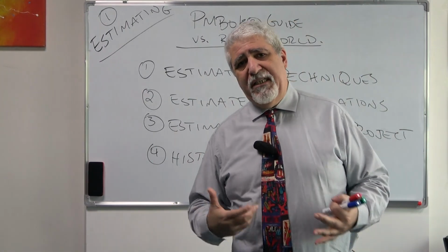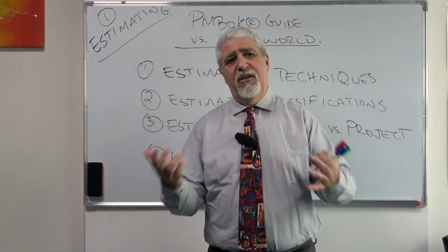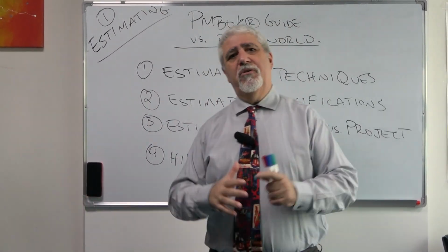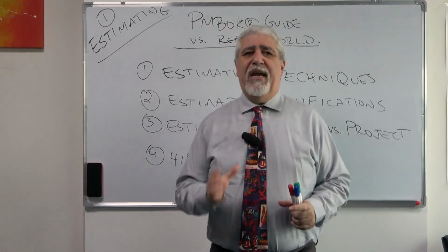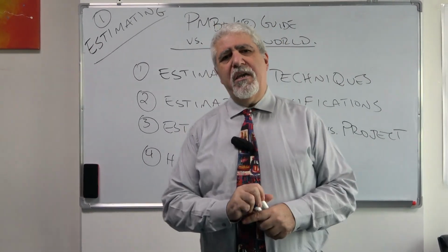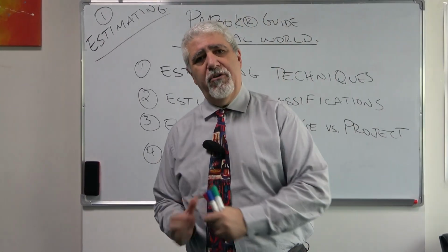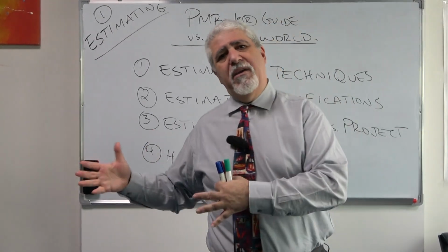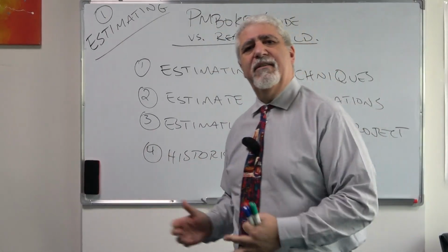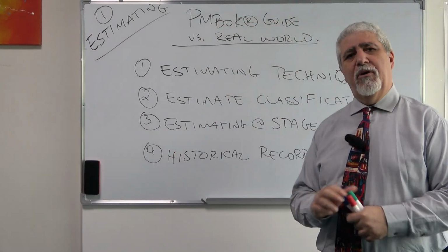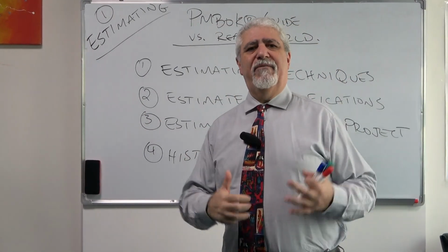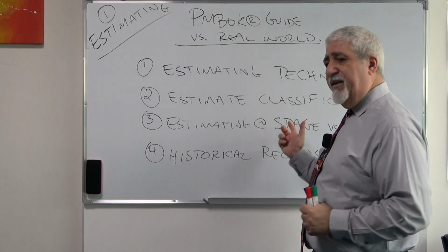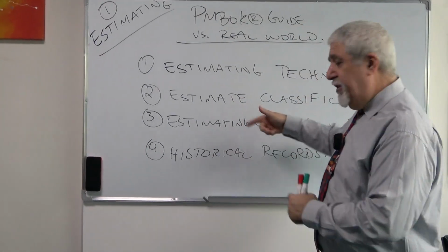So what organizations like AACE tell us, and other literature, is that they come up with about 5 different estimate classifications to use on a project life cycle. Now, does it mean we have to use all 5 on every project? No. Usually, on most capital projects, if you are a project owner organization, you use 3 of the 5. And maybe your service provider, your contractor, your engineering consultant, your construction companies will do more estimating. But from a project owner perspective, maybe we use 3 estimates. I will show you what those 3 estimate classifications are later in this video, a little bit later.